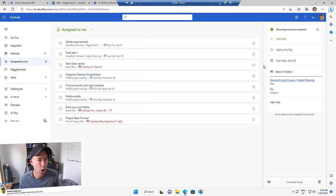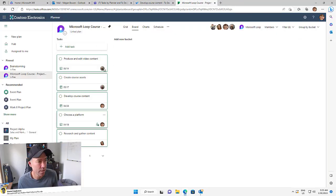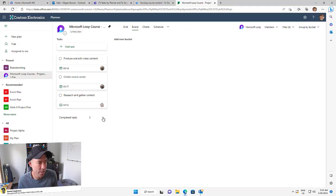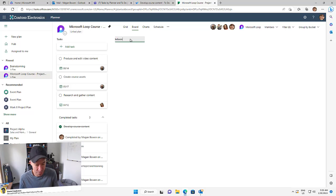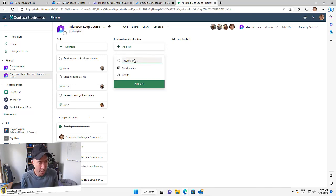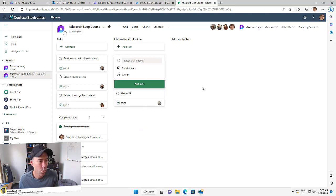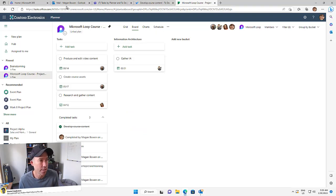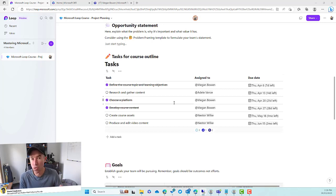Now there are a couple of nuances here. Let's say we want to open up Planner. You can see this is where we're at — let's give it a refresh. We've got three completed tasks. What if we create a new bucket? Does that create a new task list inside of the loop component or the loop page? So let's create a bucket called 'information architecture', add a task for 'gather IA', set a due date of tomorrow, assign it to Alex. But what doesn't happen is we don't get that inside of this task list.